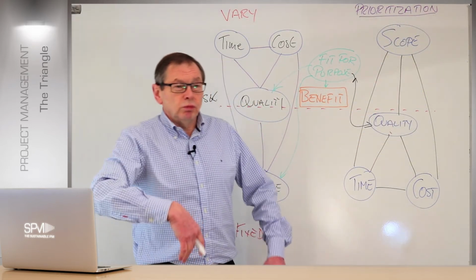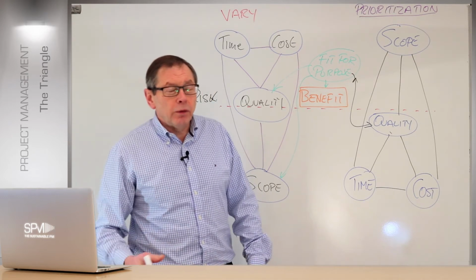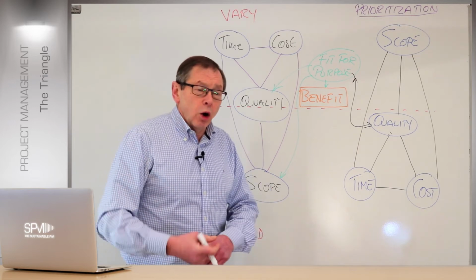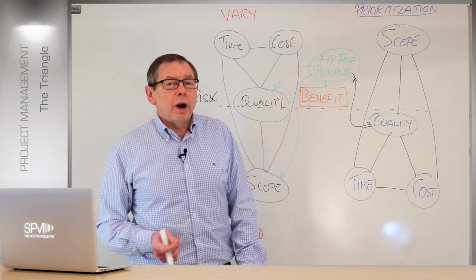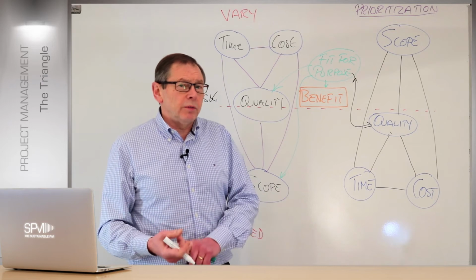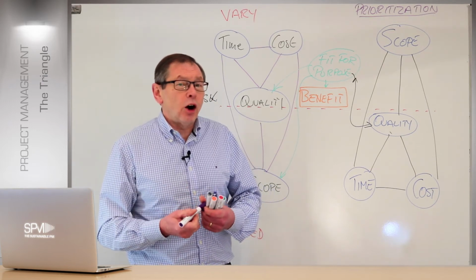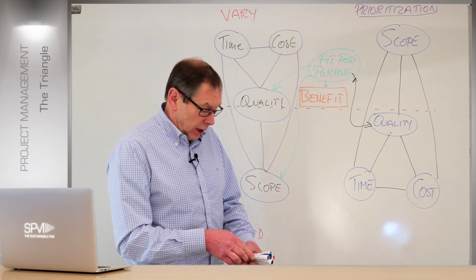Mandate, need those, ought to have them in place, they could be left off. Moscow prioritization: musts, shoulds, coulds and won'ts; ordering processes, 1, 2, 3; critical lists; all sorts of ways of doing it. Probably the most common one, the most well-known one is Moscow. So we'll have a look at that one in particular. But it's not so much that particular element that's important, it's how it is used and what it represents, okay?